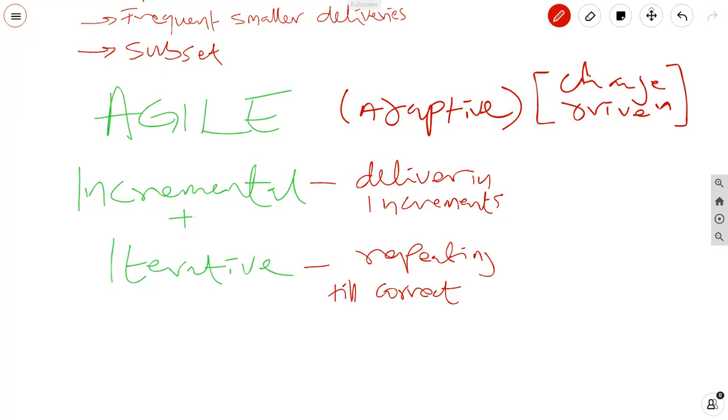So let's first read the 7th edition. It says, adaptive approaches are useful when requirements are subject to high level of uncertainty and volatility and are likely to change throughout the project. A clear vision is established at the start of the project, and the initial known requirements are refined, detailed, changed, or replaced in accordance with the user feedback, the environment, or unexpected events. Adaptive approaches use iterative and incremental approaches.